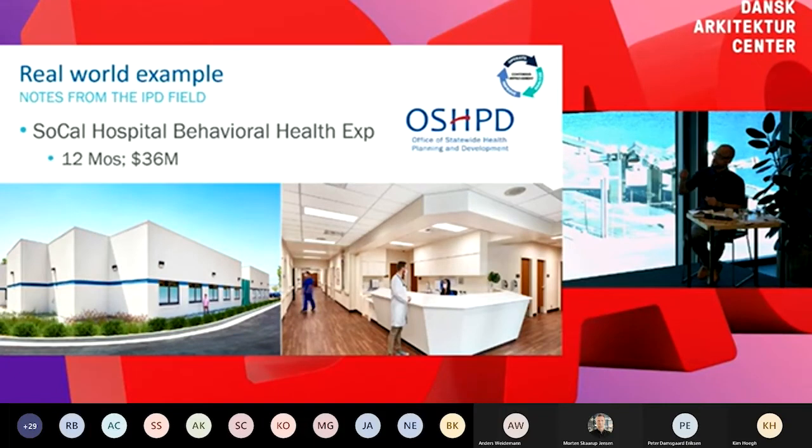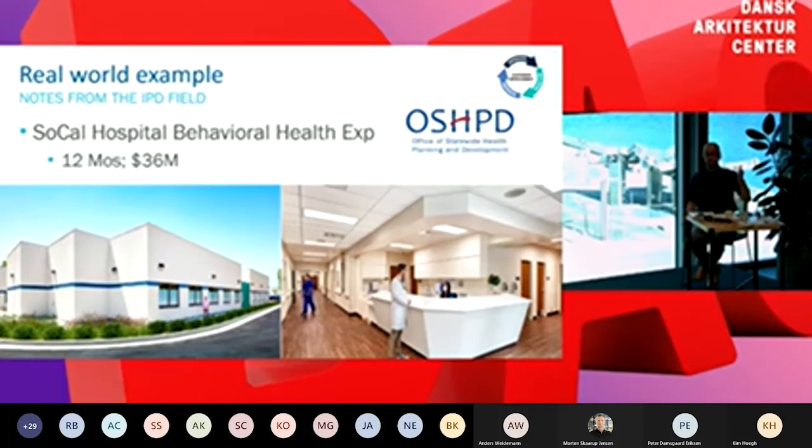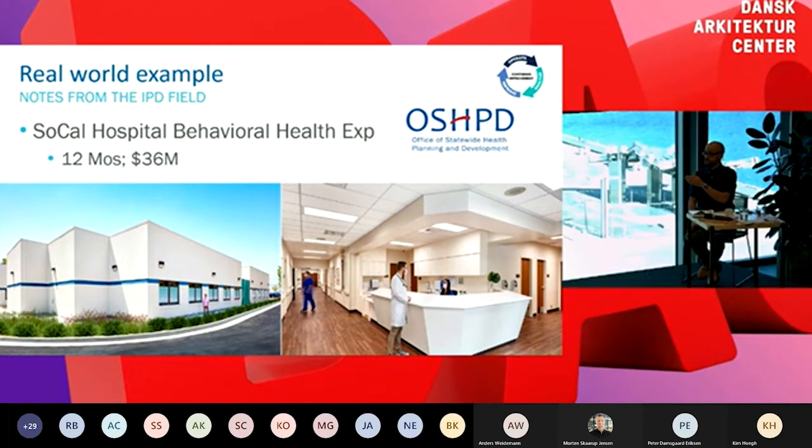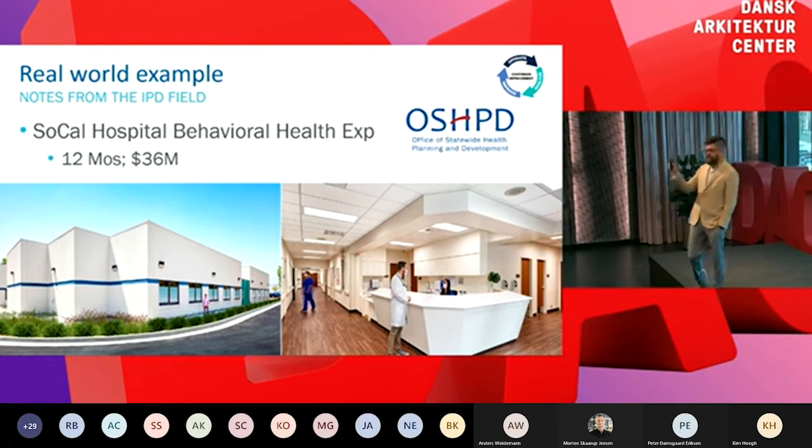Now, on this project, by the way, that was just DPR self-performing drywall and framing, kind of taking it upon themselves to do that. That concept and that idea actually turned into a whole new entity within DPR itself, correct? Correct. So now we have a facility in Phoenix, Arizona, different state lines, so you're paying a little less for the labor. And they're making close to 50, 60% of our walls now on today's projects, and shipping them to California to then just be set and installed.